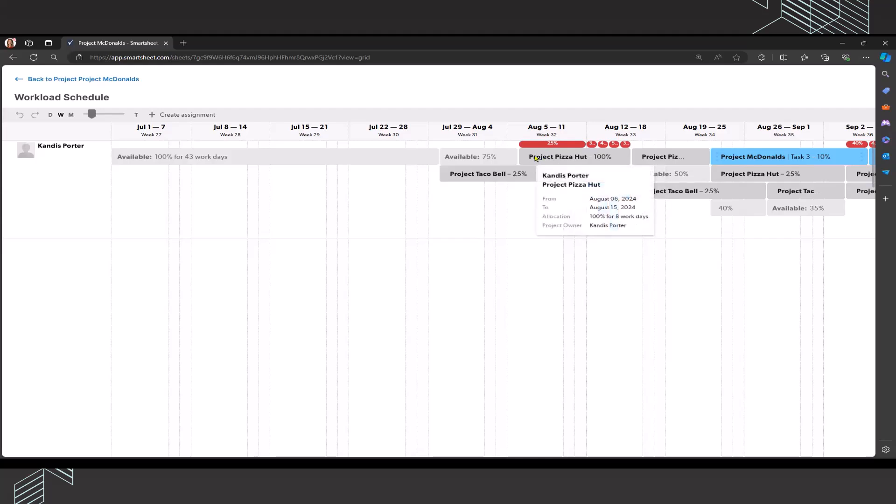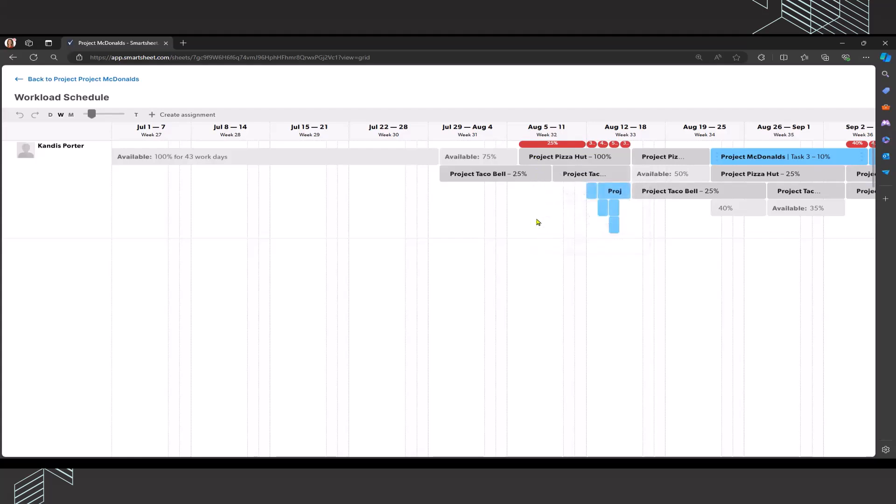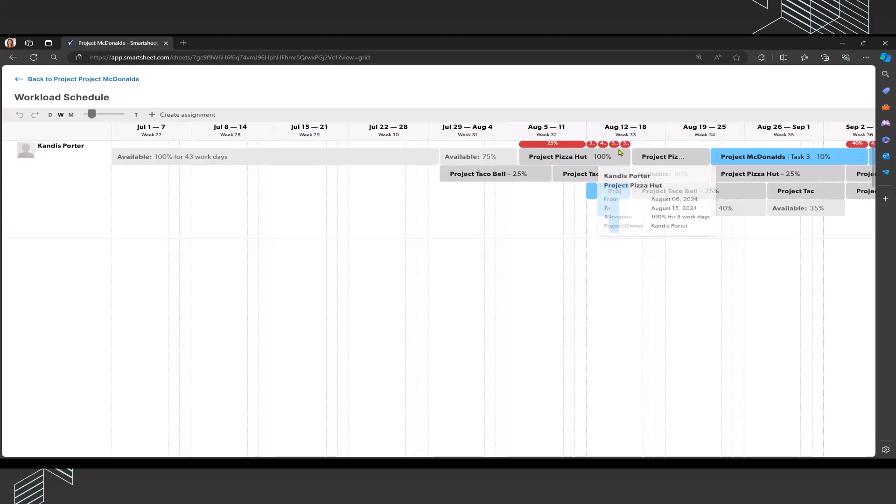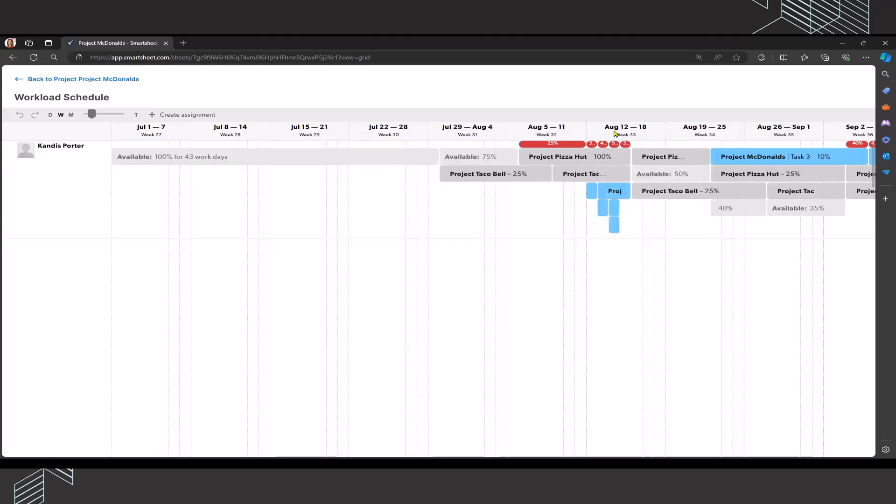The over allocation for the week of August 5th through 11th doesn't relate to this particular project. It relates to project Pizza Hut and project Taco Bell. So I'm going to need to go into those projects to address that over allocation. If I make the adjustments in those project schedules, there's a chance that it could also take care of some of the over allocation for the week of August 12th through 18th.